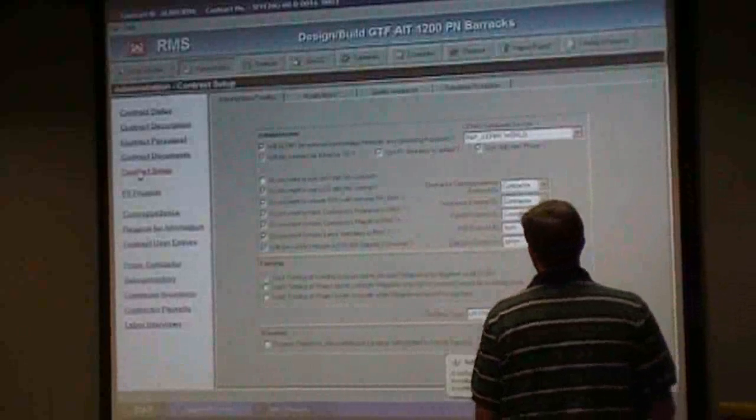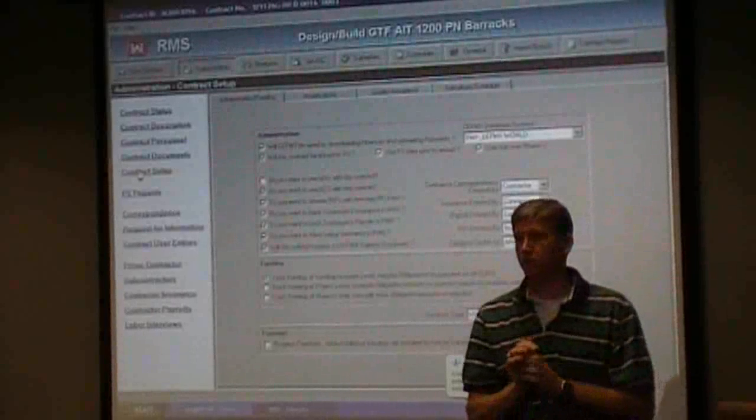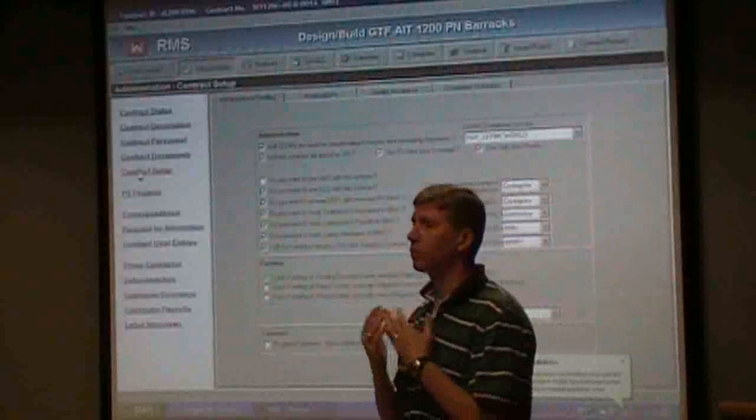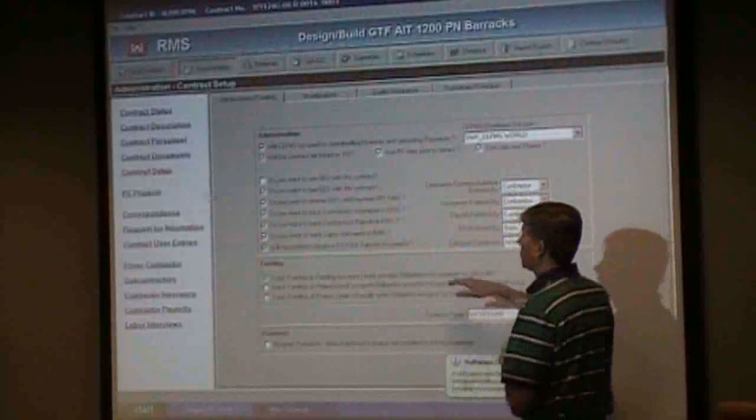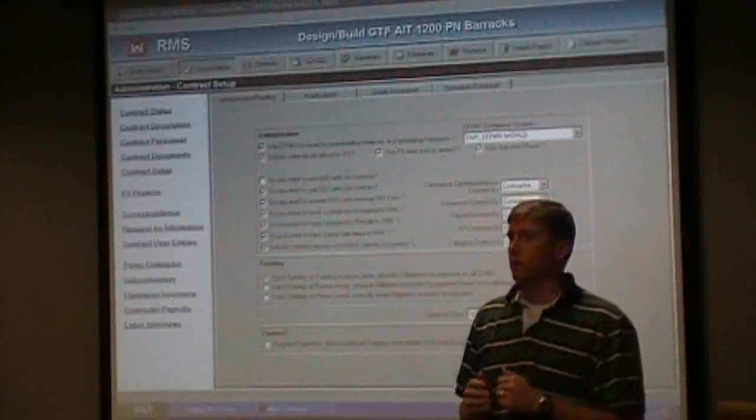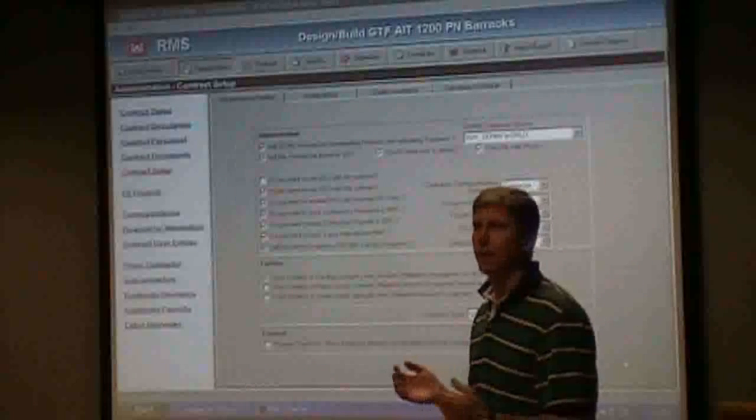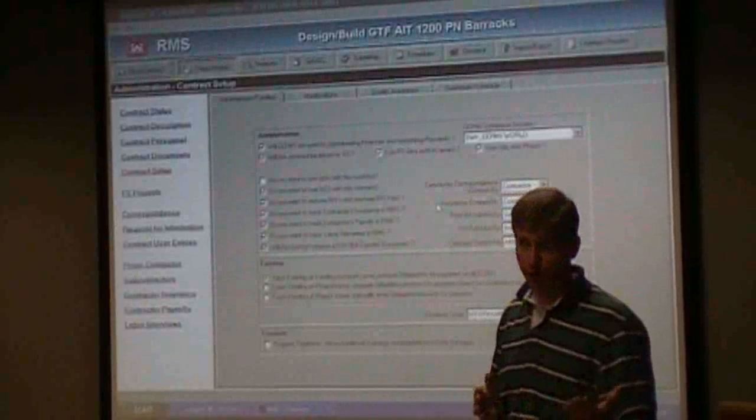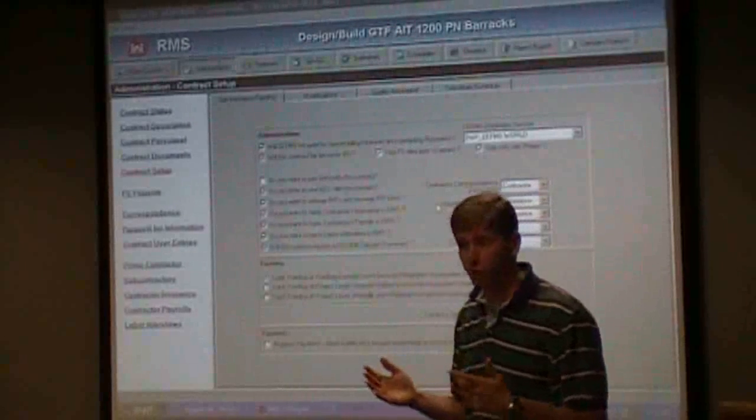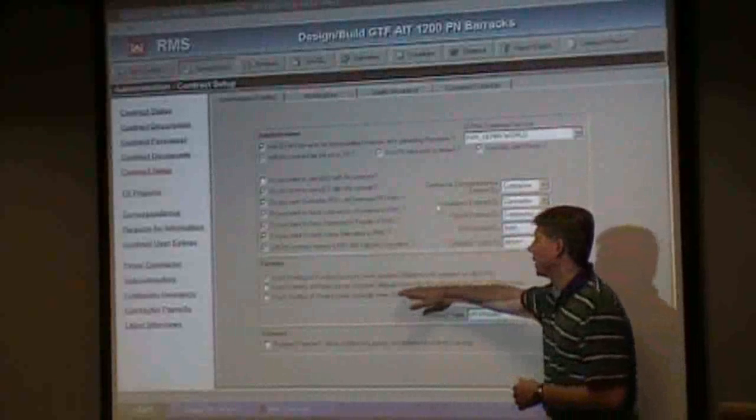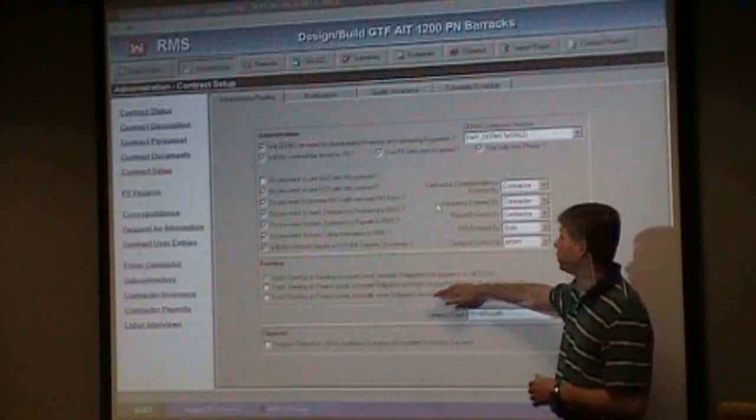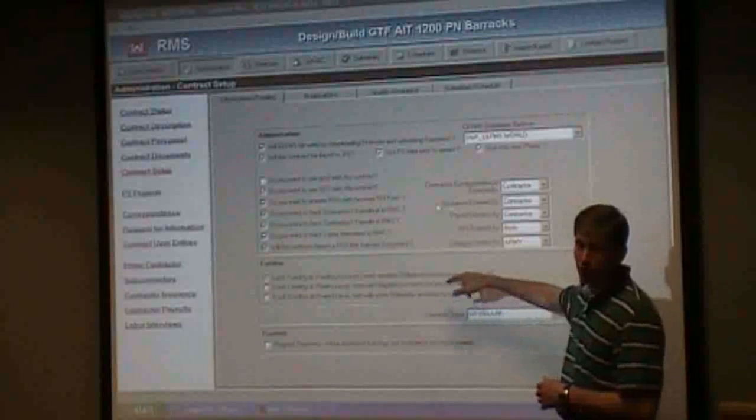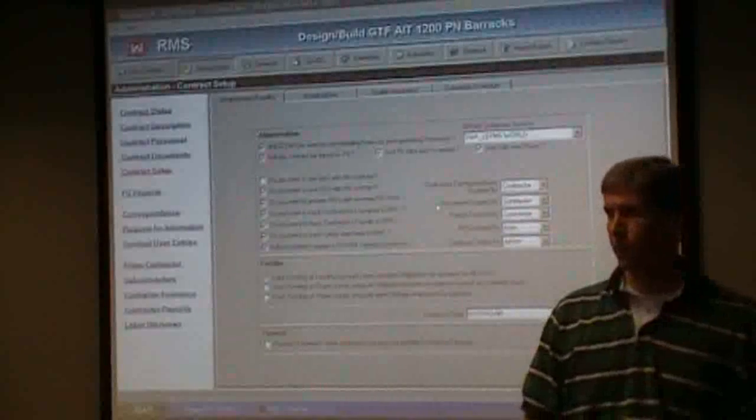Another area here is this funding, and really you should not be ever messing with this area. This is something that should be set up for you prior to you getting involved. But some of the key elements here and some of the problems we've had on these jobs down here is, okay, these are incremental-funded jobs. How do we handle that? And some area engineers have chosen to handle it a way, and some, in other places, they're choosing to handle it other ways. If you have incremental funding, basically you should be in the second or the third track here. You should not be in this first track, all right? Because the first track says, this is the amount of money you got, and you're awarded this amount of money.